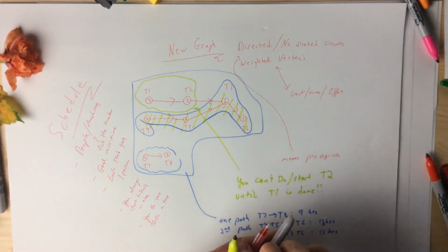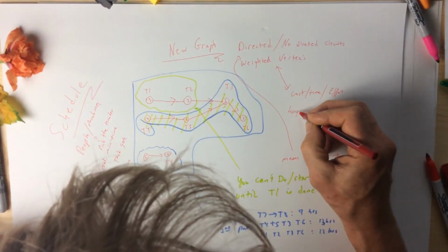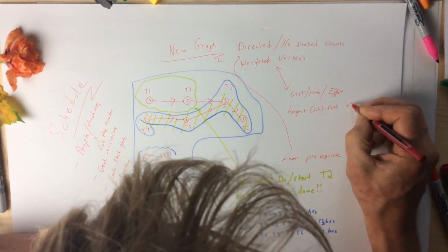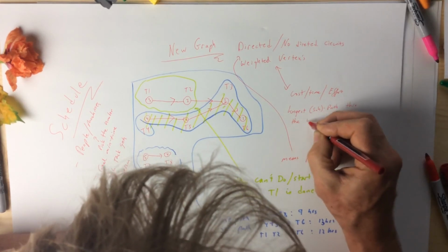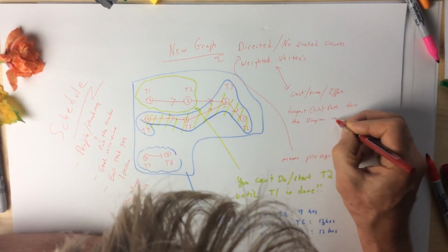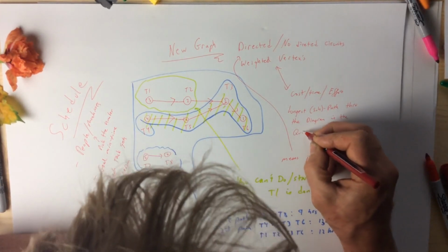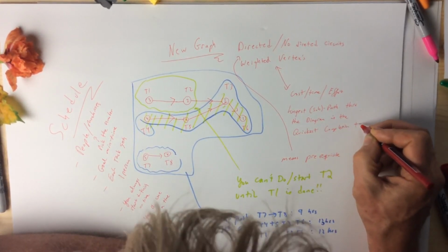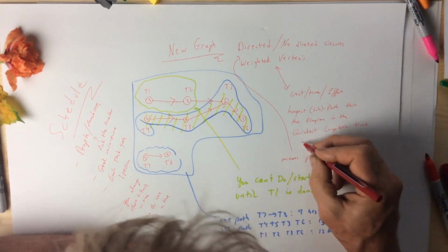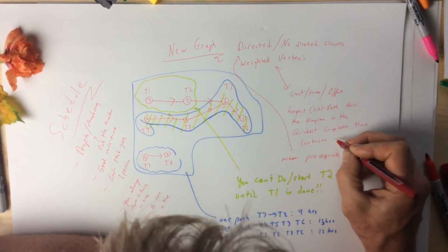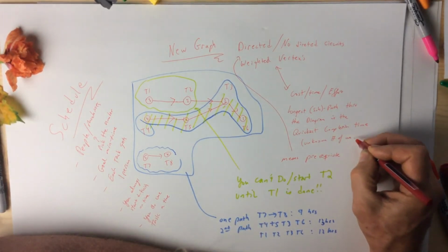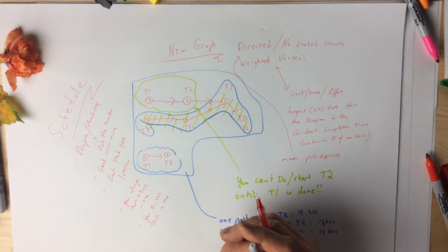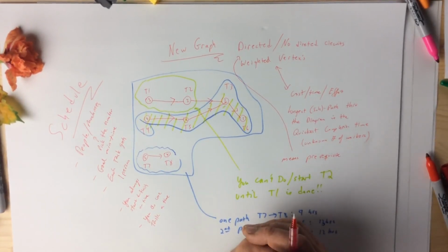So what's strange is the longest subpath through the diagram is the quickest completion time. That has still an unknown number of workers, but the earliest this job could ever be done is in 13 hours.